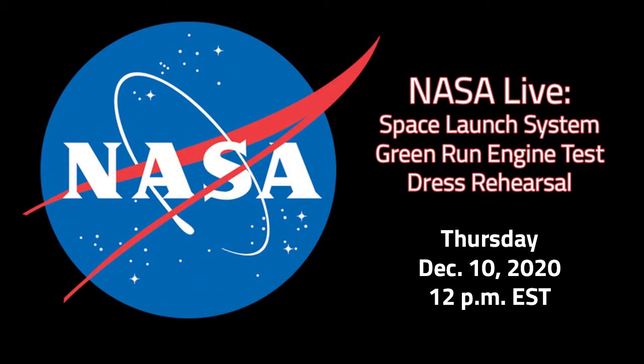So on Monday, the team successfully loaded a limited amount of liquid hydrogen. It was cooled to minus 423 degrees Fahrenheit. We had no issues with this operation. All the data looked really good, and it provided us an opportunity to see how the tank and the main propulsion system reacted with the fuel loaded. It actually decreased one of the risks we had going in for this new design and development, to get this hydrogen tank partially loaded for the first time. That was a big milestone for the team, and everything looked really great there. We saw no leaks on this first load.